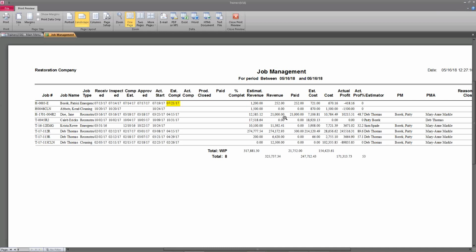So if my budget is $5,000 and I've spent $2,500, I'm going to say Mr. PM, or in some cases, an estimator writes and runs. Whoever is responsible, or maybe it's a team. What's your ballpark percent complete? If they come back and say, oh, we're about 25, 30% done, I'm going to say, why are you over budget? You spent half the budget. How are you going to do 70% of the work with half the budget? Very few good reasons for that.